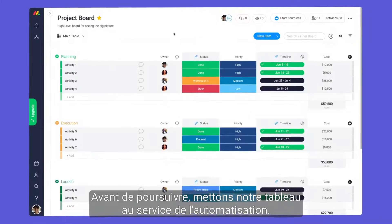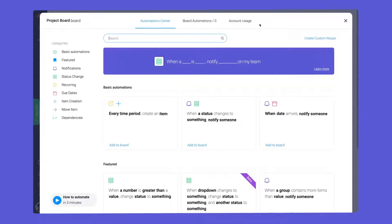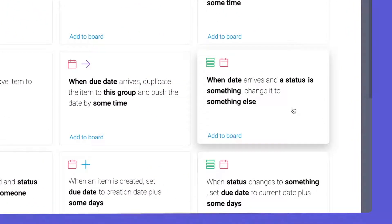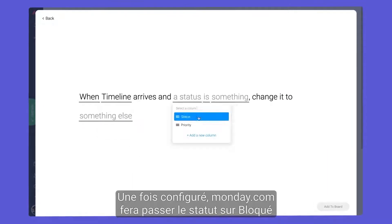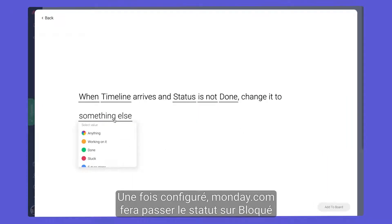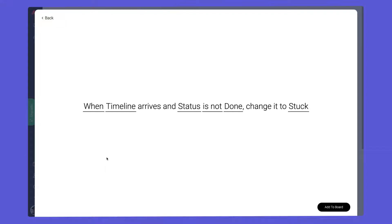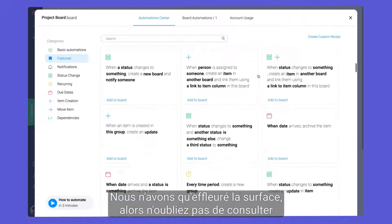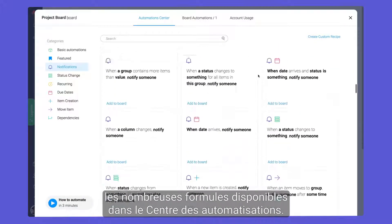Before moving on, let's put our board to work with automations. Once configured, Monday will change the status to stuck if an activity is not done by the due date. We are just scratching the surface, so be sure to check out the many recipes available in the Automation Center.